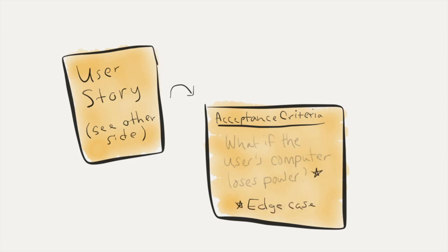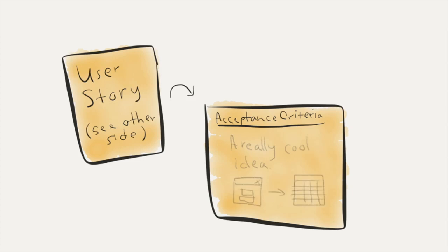Be sure to separate the edge cases from the typical activities or acceptance criteria, but don't exclude them. The delighters are the cool features that go above and beyond to please the users. Again, keep them separate, but don't exclude them. Illustrate your user story through low-fidelity mockups, process models, or input-output tables. This will help others visualize the outcome. They also offer the project team something to discuss and ensure the user satisfaction will remain high.